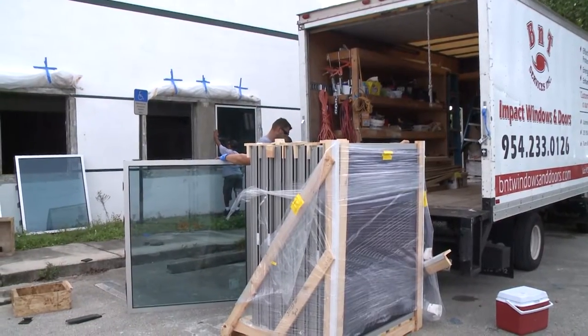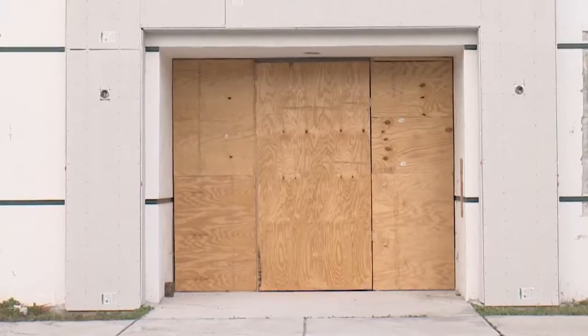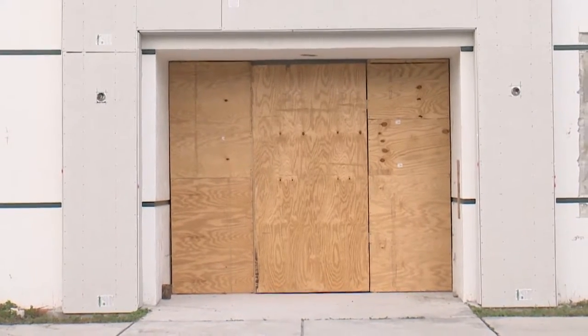Construction site today, as you can see, with all the crazy sounds and the heat in Florida, it's really hot. And I'm managing four different projects at once. We have the windows going in today, and actually, our doors aren't coming in today, which is unfortunate. It's moving a little bit slower than I would like, but it's getting done. The problem is we don't have doors yet, and so we can't get the building sealed up and under air.